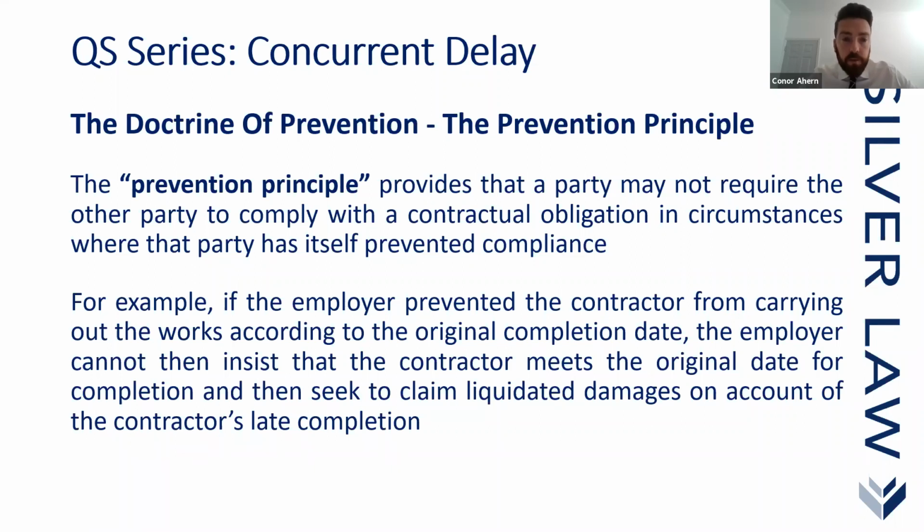And now what we mean by that is, if the employer prevented the contractor from carrying out the works according to the original completion date, the employer cannot then insist that the contractor meets the original date for completion and then seek to claim liquidated damages on account of the contractor's late completion. So that's the prevention principle. It's where basically a party cannot benefit from its own breach.